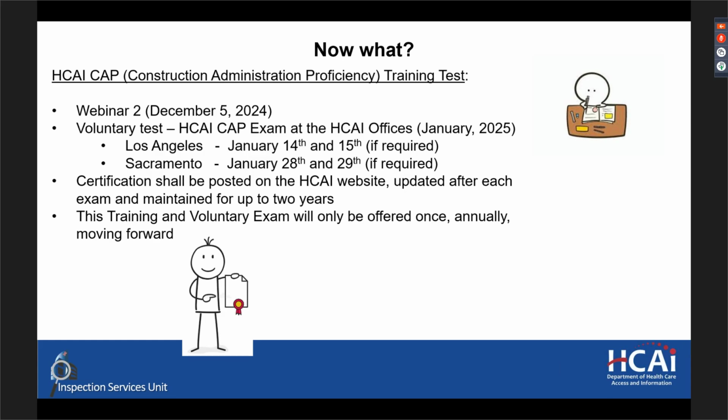Thank you. And there is a question, who has a responsibility for posting RFIs and change orders to the record drawing set? And who checks this? RFIs do not need to be posted to the approved drawing set because they won't be inspected to. Change orders, meaning ACDs after they're approved, that's a decision that the project team can come up with. I've seen contracting entities do that. I've seen inspectors do that. And I've seen architects do that.